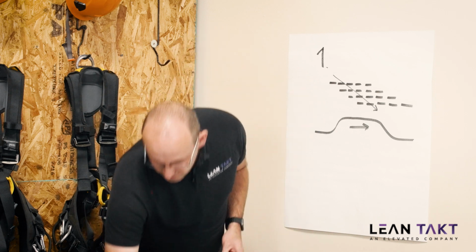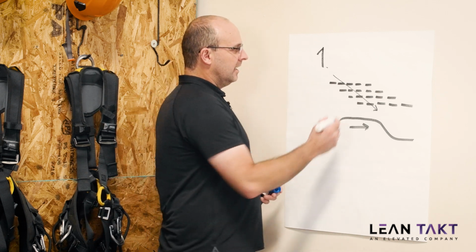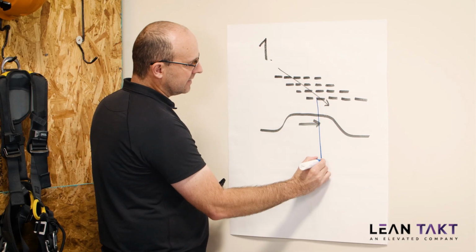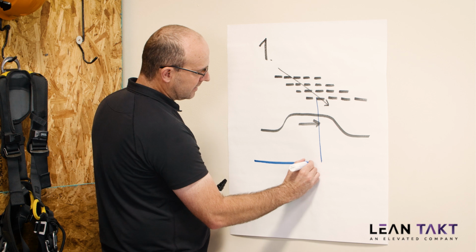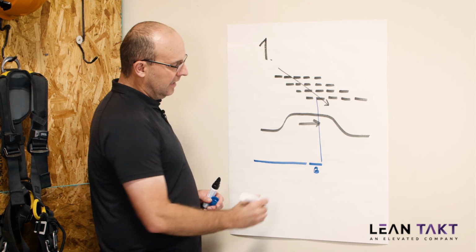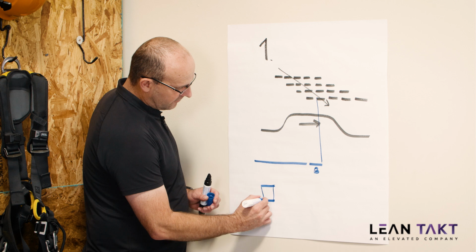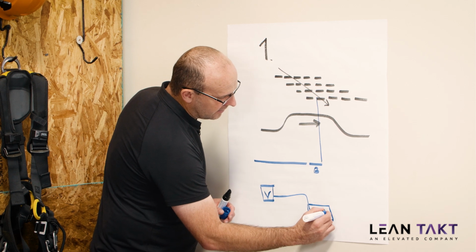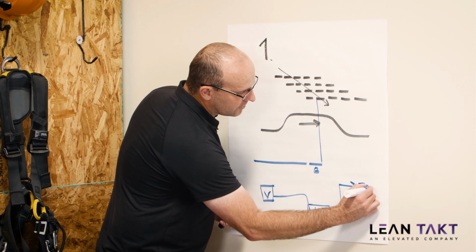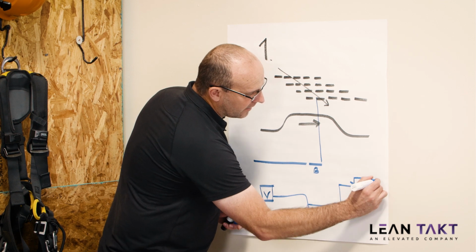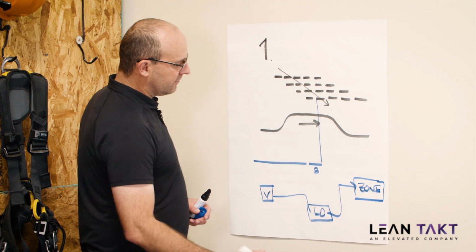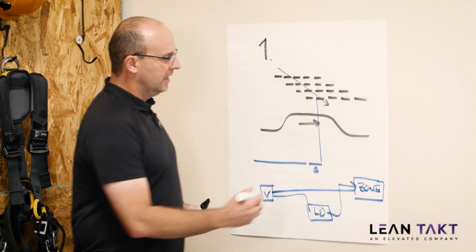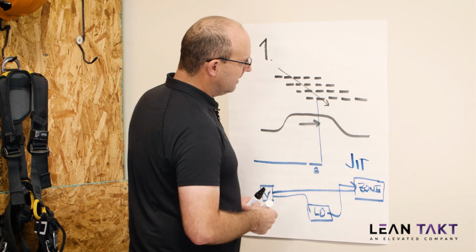The other thing, and I'll go ahead and mark this with blue, is that when you bring your materials out to the project site, right, let's just take this activity from an example. You will map out that supply chain, but also with a bit of a buffer if you need it, which means that your materials may come from a vendor. They might need to come to a laydown yard, okay, and then they go to the actual zone. So we're not actually tripping over and moving the stuff all over the place. It either comes from the vendor directly to the zone or through a laydown yard to the zone, just in time to pace with the Takt plan.